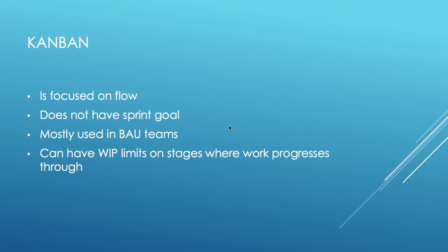Well, Scrum is very effective when you're running down a deadline, when you are chasing a sprint goal or an objective. And that's when you want to use Scrum. It really is as simple as that. When you have a deadline, when you have a project or a specific goal, it becomes your sprint goal. Then you're able to chase this down bi-weekly.